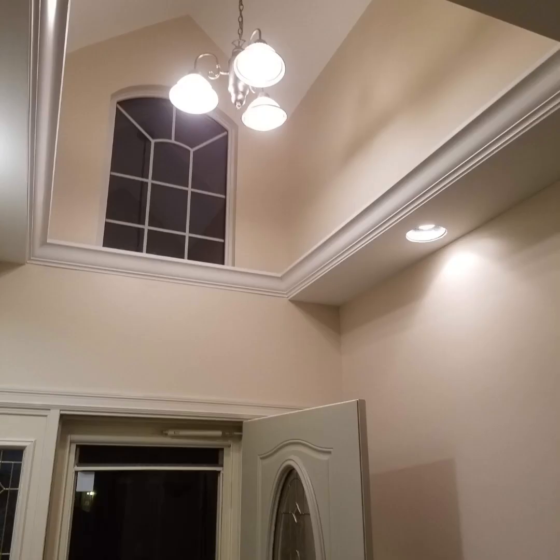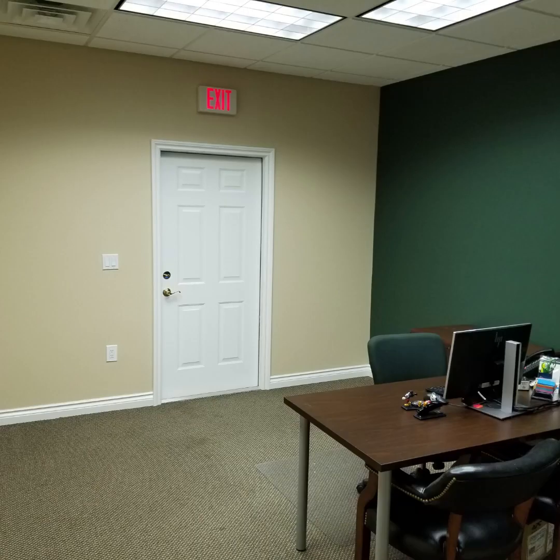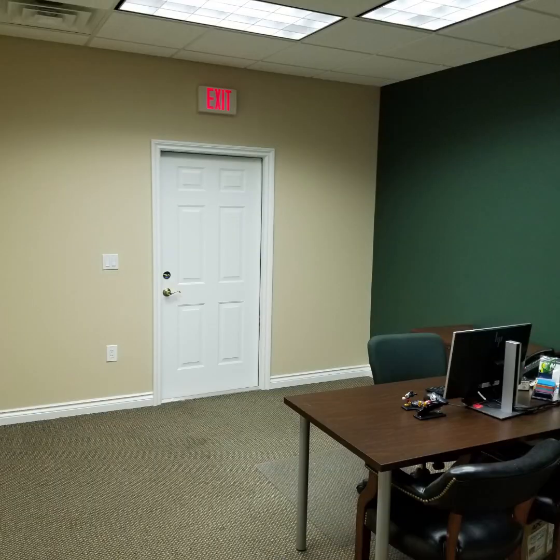Access to certain areas in houses can be difficult. This is why you charge so much money per square foot, because nobody wants to get up there and do the work itself. And stairs, make sure you don't get any paint on that carpet. And again, hard transitions, you have to look at that when you're quoting painting projects. And the color of paint, like the red, absolutely, it's going to be a little more because it's going to show, and you're going to get those hard transitions. You want to keep that in mind.